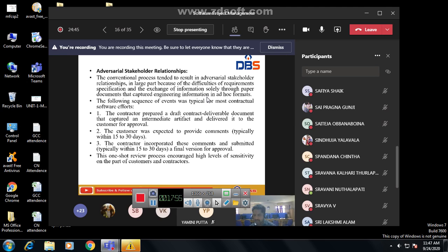So we say we want to implement it like this, as we already discussed. So the contractor prepared a draft contract deliverable document that captured an intermediate artifact and delivered it to the customer for approval. And the second one, the customer was expected to provide comments within 15 to 30 days. And the contractor incorporated these comments and submitted a final version for approval within 15 to 30 days.